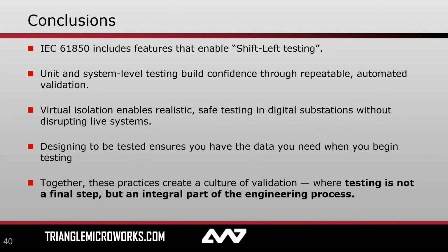So with that, we come to the end, and I'll talk a little bit about some of the conclusions, some of the things that I hope you guys were able to take away from today. The first is that shift left testing, or testing earlier on in your engineering process, is very useful and very helpful, and leads to a smoother and easier commissioning, saving you time and money, because these errors are easier to correct the earlier you find them.